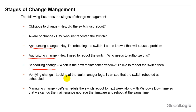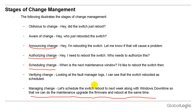Verifying change: you can look into the fault manager logs and see that the switch got rebooted. Overall, managing change is better when scheduled with proper timing and proper intimation, with proper communication to all affected areas. For example, schedule the switch reboot to next week along with the Windows downtime. Every month we have downtime for Windows fixes and patch management, so it is better to align with the existing downtime and perform the maintenance so users are not affected.